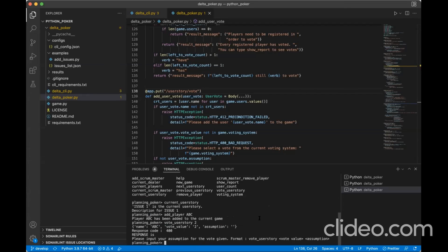So even this is working, and that's it. That's my user story. My second user story was to connect to the API. So my connection-to-API Python code is ready. In the next sprint, I'll integrate that in our project. I'll break the user story in two parts: half is done in sprint one, and the other half will be picked up in sprint two or subsequent sprints, anytime. That's it.